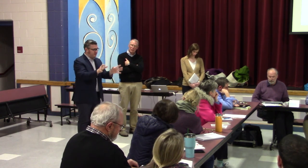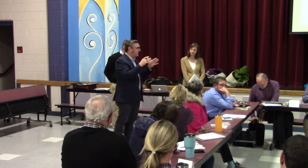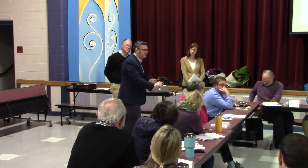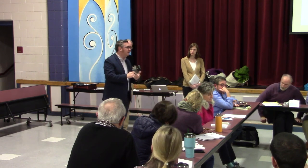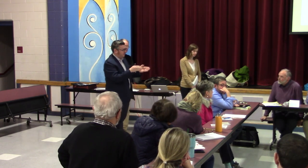This is all a very staged approach where you have your initial study to see, okay, say for instance you want to completely overhaul this building. The first thing we would do is look at what would need to be done to this building to overhaul it. We've done a lot of that already, but now it would be down to the detail items that we're going to be putting in here. Not necessarily a brand, but specific items that we've installed in here that would help drive the cost, and indicate what that cost would be for a bond that you would vote on and then proceed with construction at that point. So you need that upfront effort to study that.